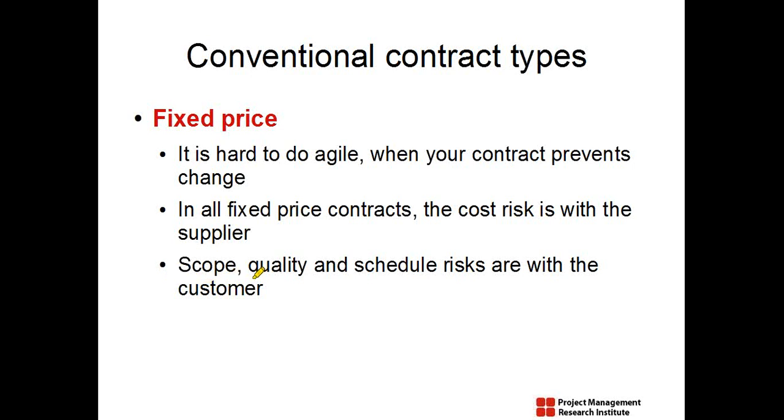Part of it, then the quality is also maybe a problem, because only in the last minute you'll know about the bad quality or good quality or whatever it is. And even the schedule, you may not have a lot of control, because it's one big bang release. That means you'll get the bad news very late in the cycle.